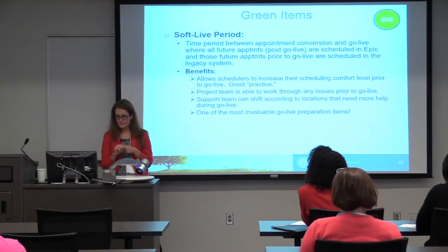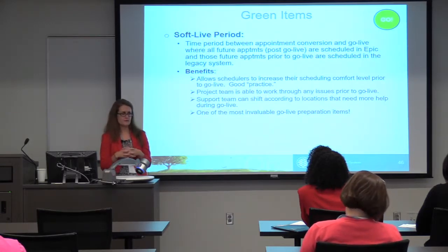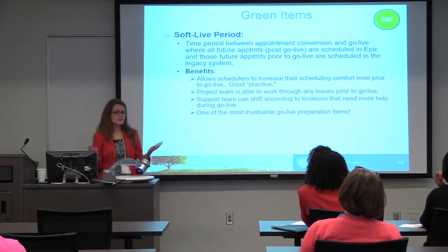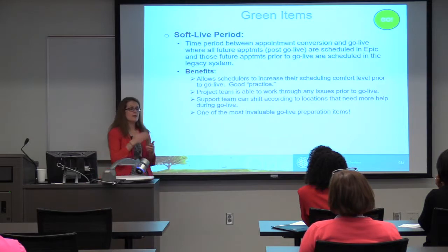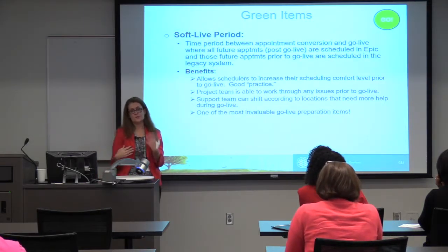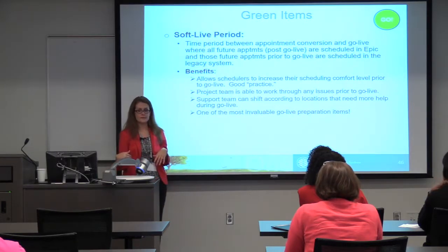So that's one of the bigger benefits: it increases the comfort level that our schedulers have. We also run into issues during soft live that we're able to quickly resolve prior to Go Live. So we're able to fix it before they're 100% live on Epic. It also helps us shift our focus.